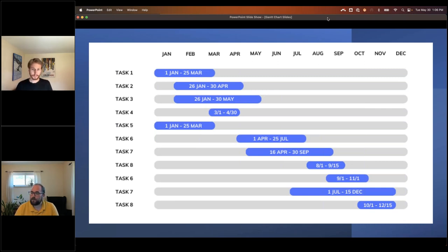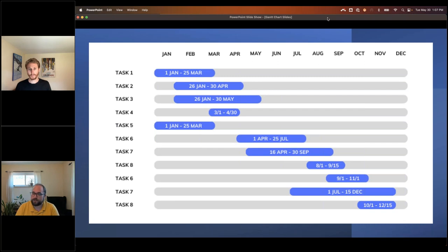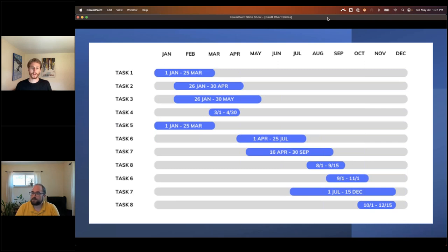So what does creating dependencies in Gantt charts actually mean? With a regular Gantt chart, if task two gets delayed, the person looking at the chart has to manually update all the dates for dependent tasks. With automation, we can make it so that those tasks drift by themselves — if somebody marks task two as finishing a week late, then task seven and anything dependent on task seven will slide right along with it.